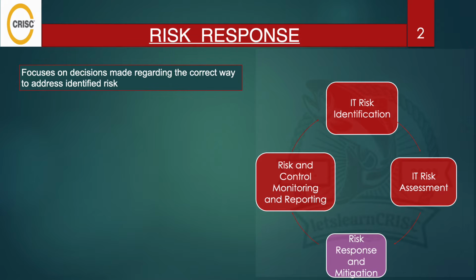Next, risk categories. We have risk options and risk response. In risk options, the organization has several options when dealing with risk, like avoidance, mitigation, transfer, acceptance, and exploitation. On the other hand, for risk response, for each identified risk the organization develops a risk response plan that outlines the chosen risk response strategy, responsible parties, timelines and resource allocation. Friends, these plans provide a structured approach to addressing the risk.